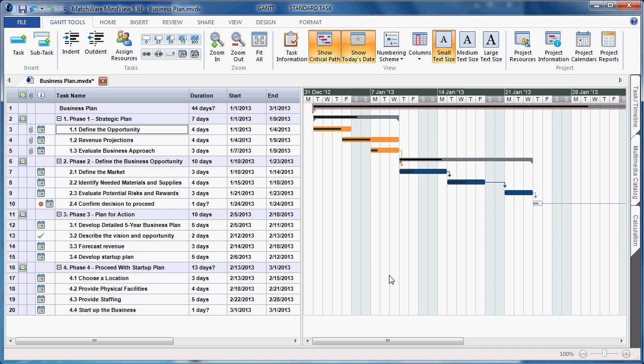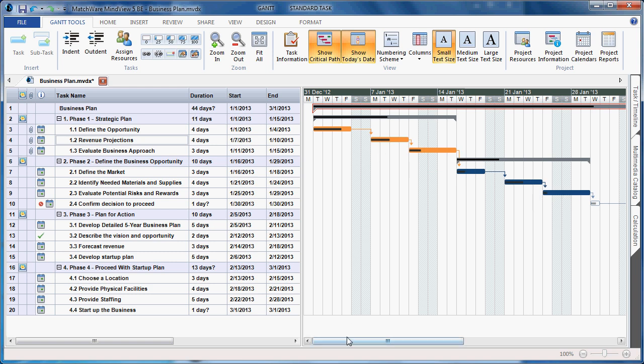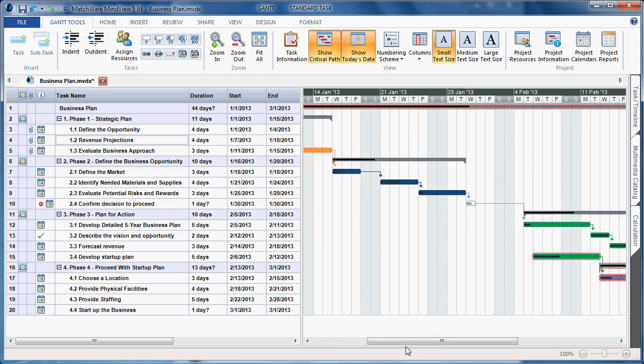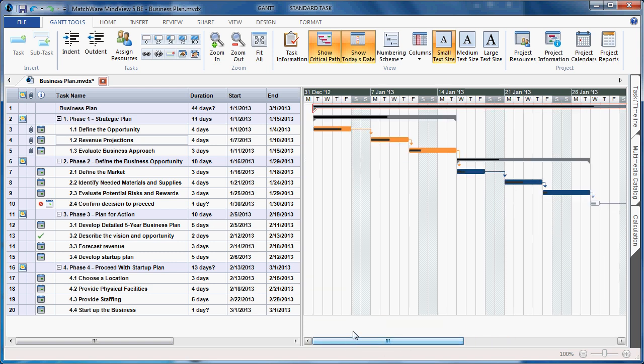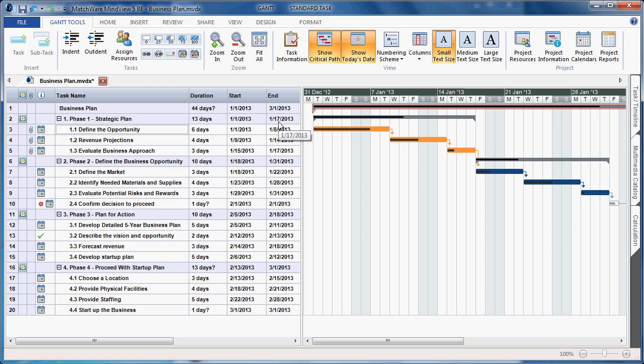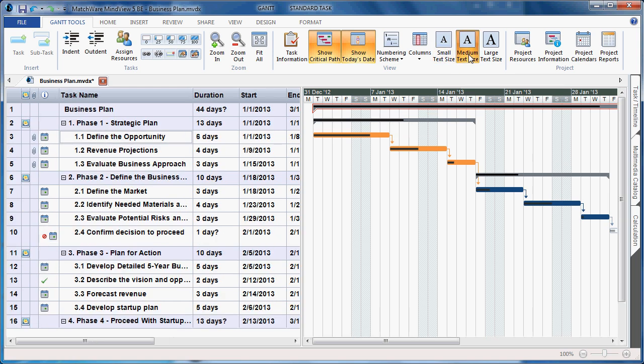I also have the ability to create predecessor relationships in a drag-and-drop method. By left-clicking on a prior task, I can drag a line and point it at the next task in question, creating a basic finish to start predecessor. This allows me to visualize my task information and associate any according predecessors. Predecessors are important where if a duration of a task takes longer than expected, the end date of the project will be adjusted accordingly.